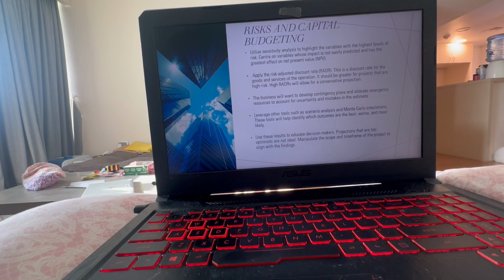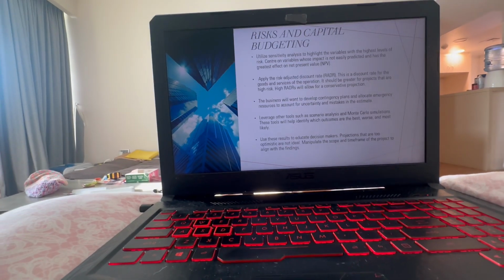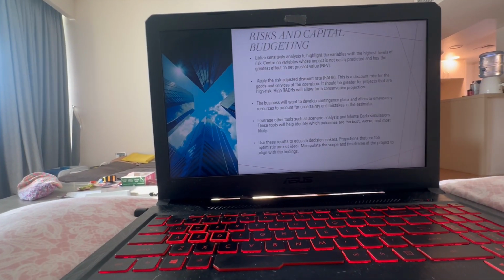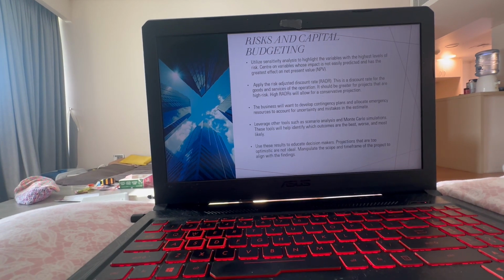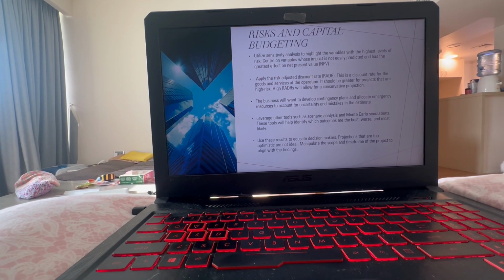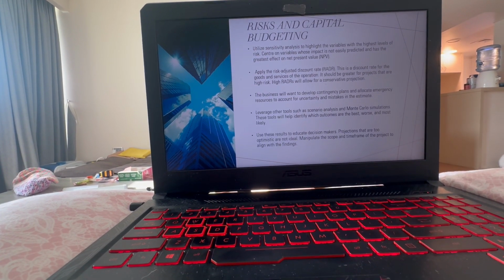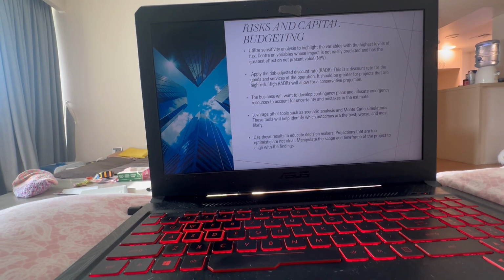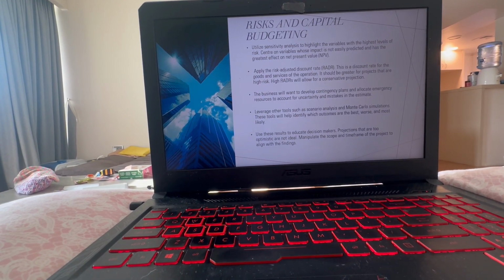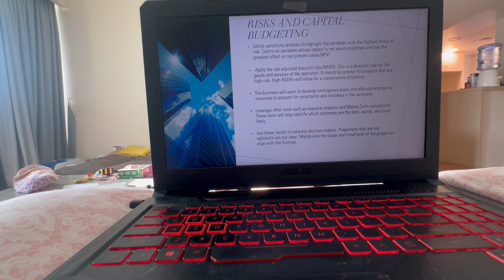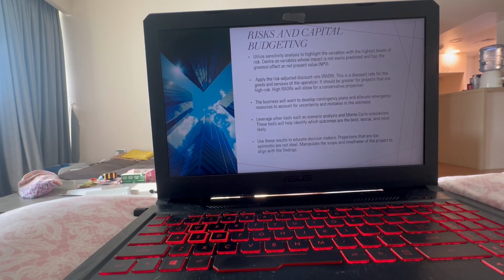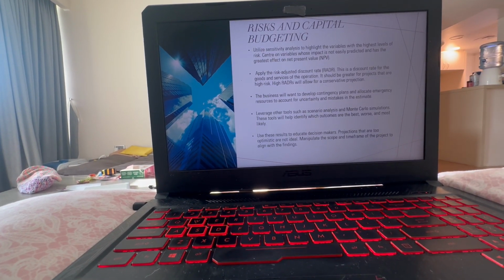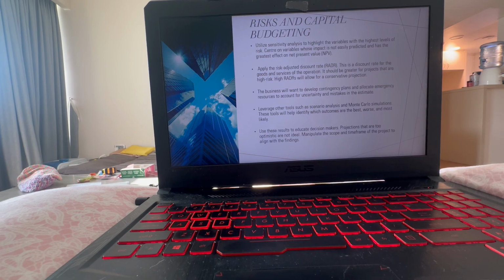You can leverage other tools such as scenario analysis and Monte Carlo simulation. These will help you identify which outcomes are the best, worst, and most likely. And with that Monte Carlo simulation, you can actually get a distribution bell curve of the likelihood of different situations.